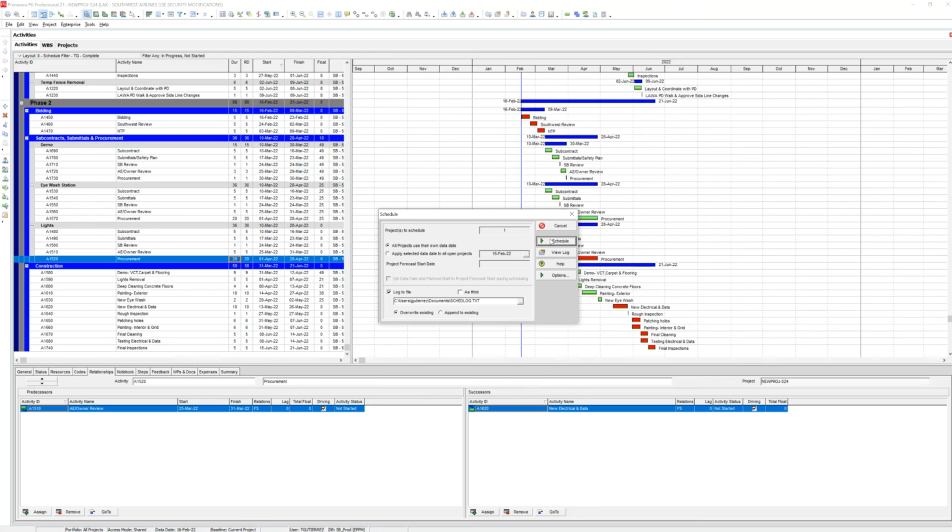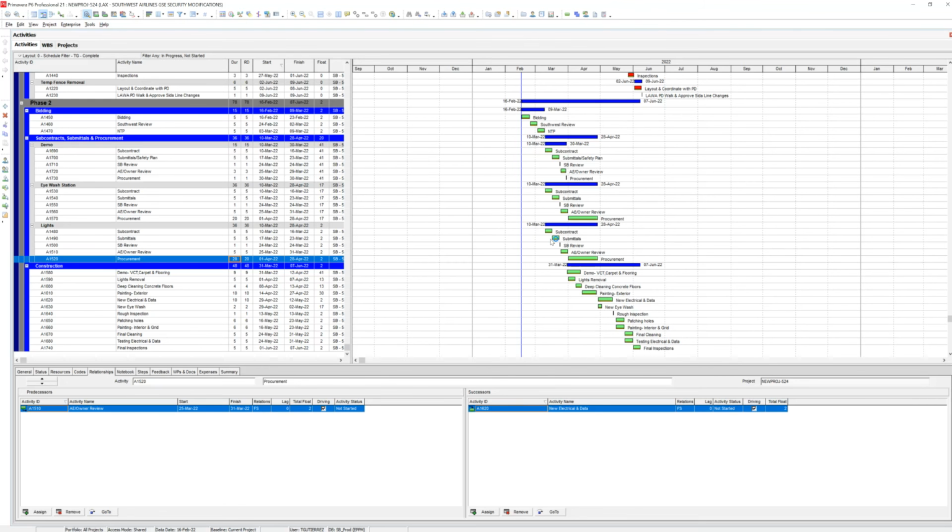This is where procurement, most of the time, our schedules aren't messed up because of activities. It's usually we don't track certain procurement things. So now you're in June 7th, right? Why is yours so long? Yeah, we kept the same duration and you were tracking procurement.